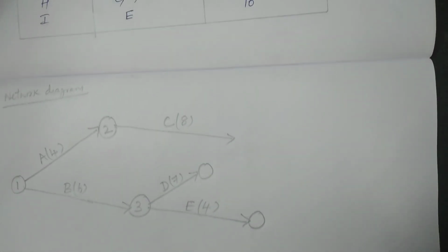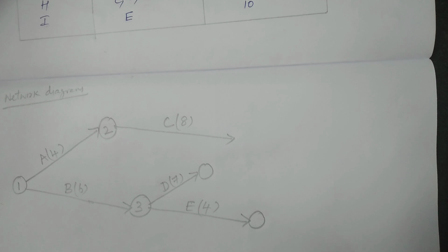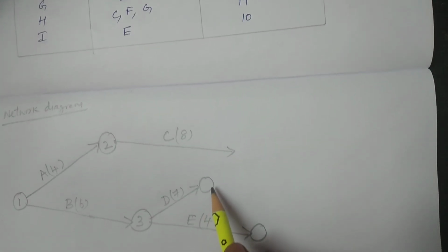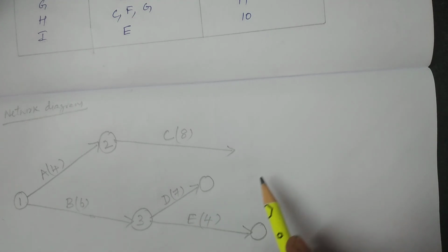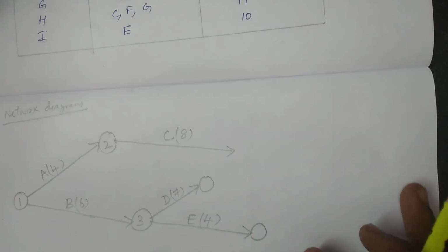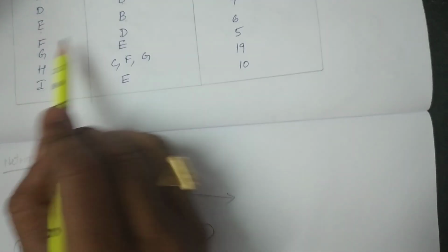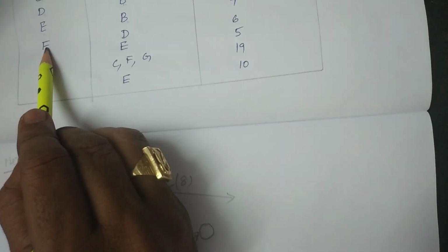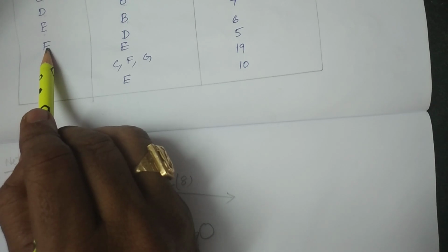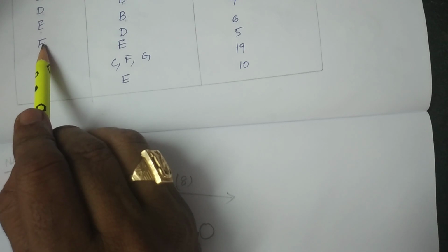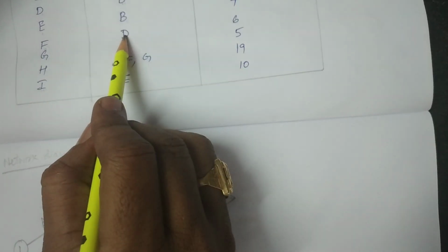And then I see the remaining relations. I have not extended D too much in length, because D is an activity which is to be finished before starting the activity F. That is, for the activity F, D is a predecessor.